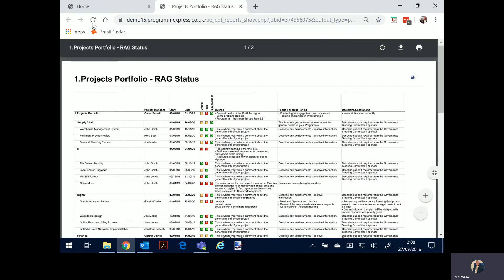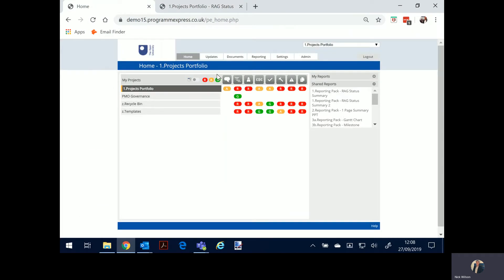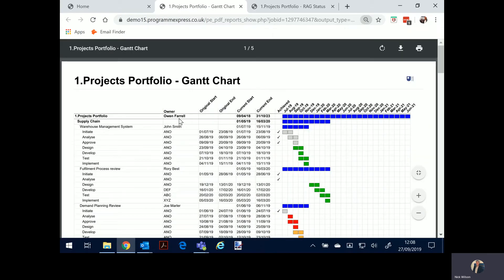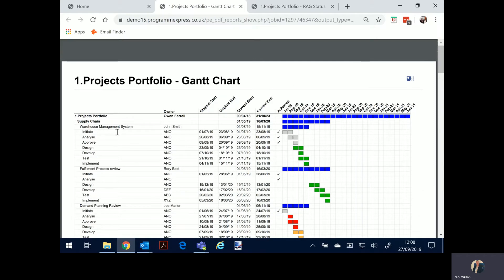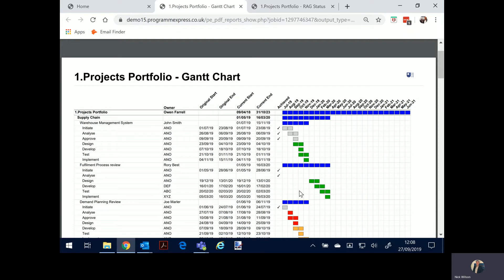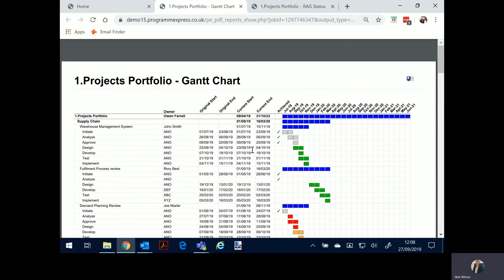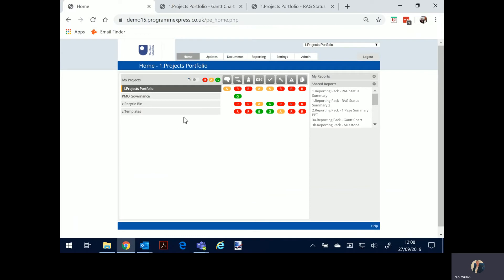Another example, because we've got planning information we could go and run our Gantt chart report again at the portfolio level, but we can run this report at program level, at project level, or we can set up our own portfolio if we so wish. You'll see here all the projects and the phases and we use the task bars of red amber green, green being on track, red being it's missed a key milestone, amber being it's forecasting to be later than expected. So a couple of examples of how quickly you can get project MIS or program reporting and information.